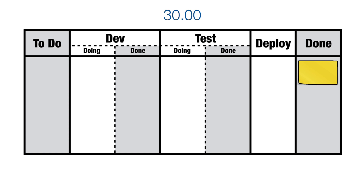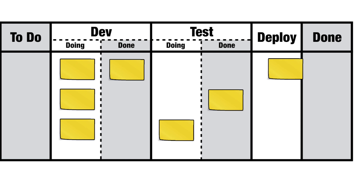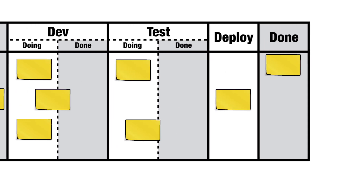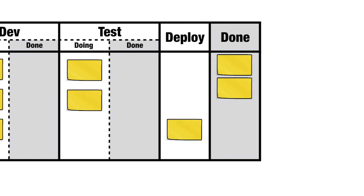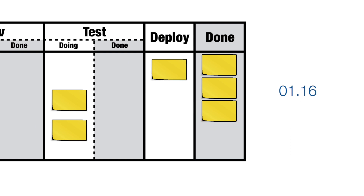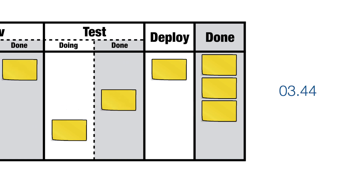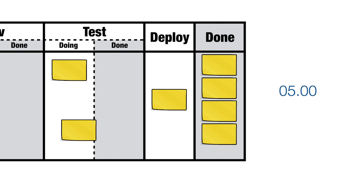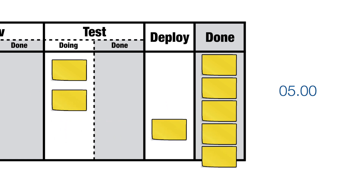End to end, that was about 30 seconds, so two items per minute. There are six people on this team, so I think we can do a little bit better than that. Let's add some development-appropriate music into the mix. Lots of things now happening in parallel, and it looks like things are popping out about every five seconds or so — around 12 per minute. Tidy indeed, and a useful metric.